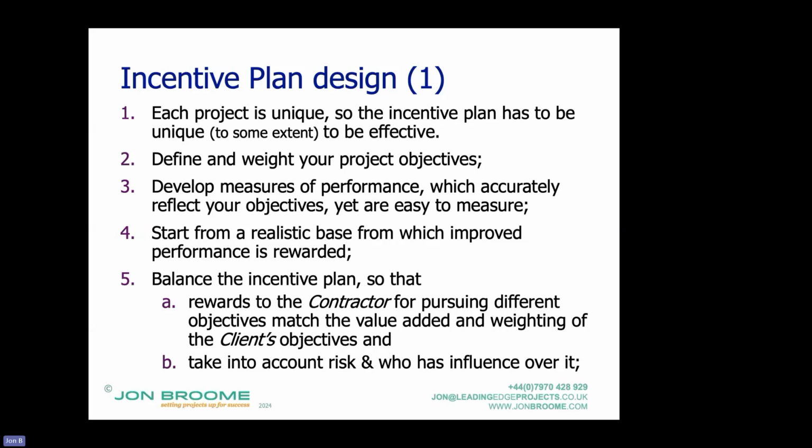And yes, we graduate it, so they could get £25,000 or £50,000 and so on. But the contractor looks at it and goes, yeah, but to achieve that level of performance, or each unit of performance above the contractual minimum, I have to spend more than the incentive. Therefore, I'm not going to pursue it. Let's say it's power consumption or something like that over the whole lifetime.